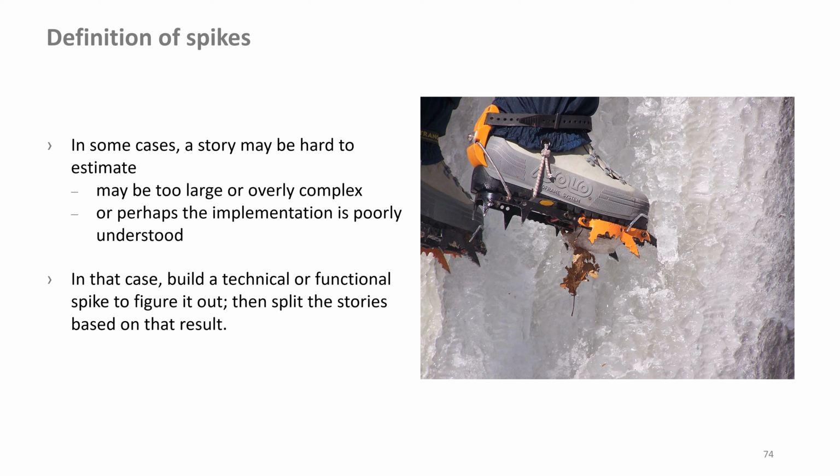The results of a spike are different from a user story because they usually produce information, not working code. A spike can lead to a decision, a prototype, a storyboard, a proof of concept, or some other partial solution to support the end result. In either case, the spike should produce just the information to remove the uncertainty. The hidden user stories are identified and can be sized.